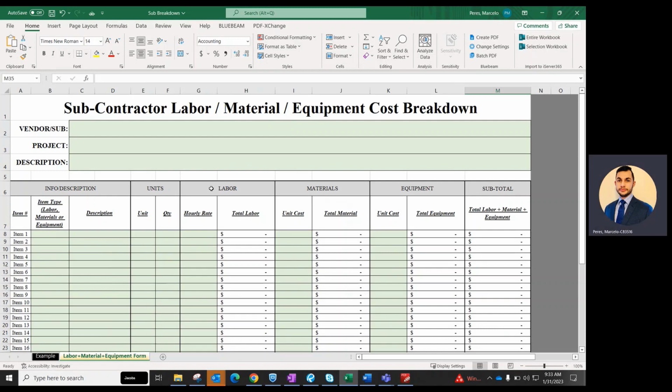With this form, the general contractor will have the opportunity to sit down and review the subcontractor's proposal before sending it to Dallas ISD. Things like, is it in compliance with the drawings? Are the labor and material rates aligned with the local construction market, or are they exaggerated?